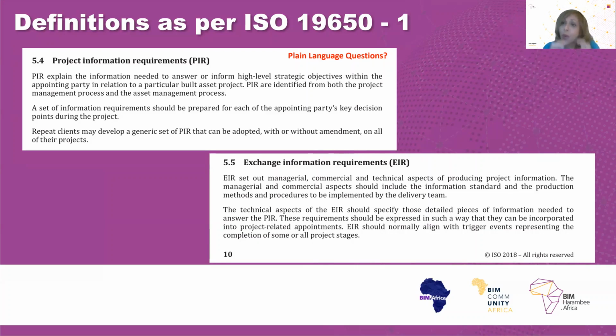They basically put requirements for the supply chain to abide by and what they want that supply chain to give them back as information from that project. This is just an overall explanation about how these different documents connect to each other. It is important to stipulate at this point that all of these 4 different types of documents could be or should be part of the contractual documents to be taken into account during creating those projects.